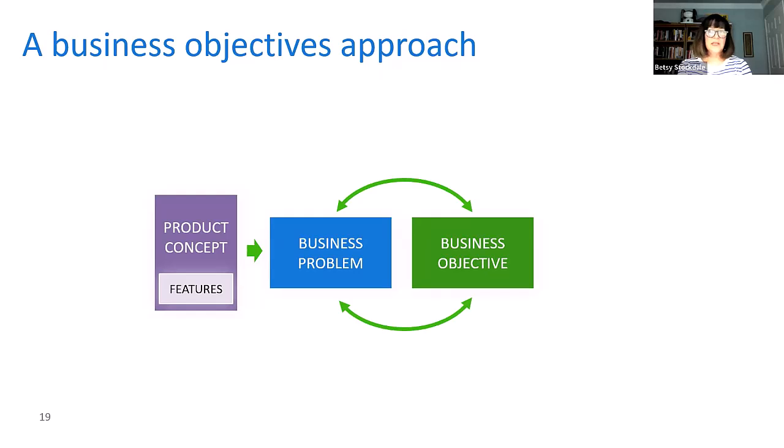Why is it that we need to fix that? What does it look like when we don't have this problem anymore? What would happen if we didn't fix the problem? What have you tried in the past? Those sorts of questions really help us develop a good, clear understanding of what the objectives are.